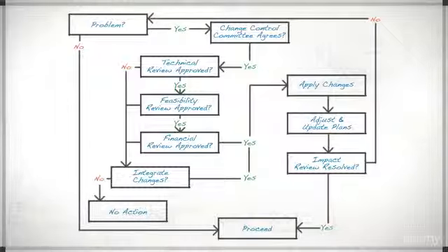Approval in the form of a technical or feasibility review, as well as financial review that would commit funds to accommodate the cost of the change. Project change requests are typically reviewed by a change control committee that is made up of subject matter experts and project team members that determine if the risk-reward ratio is worth integrating a change into the ongoing project.